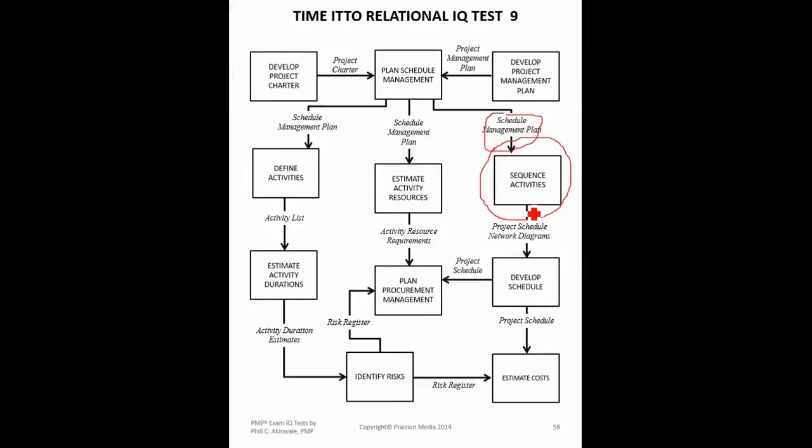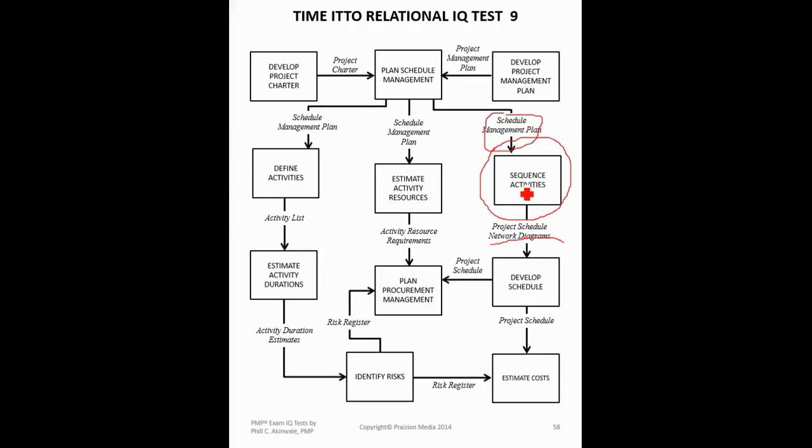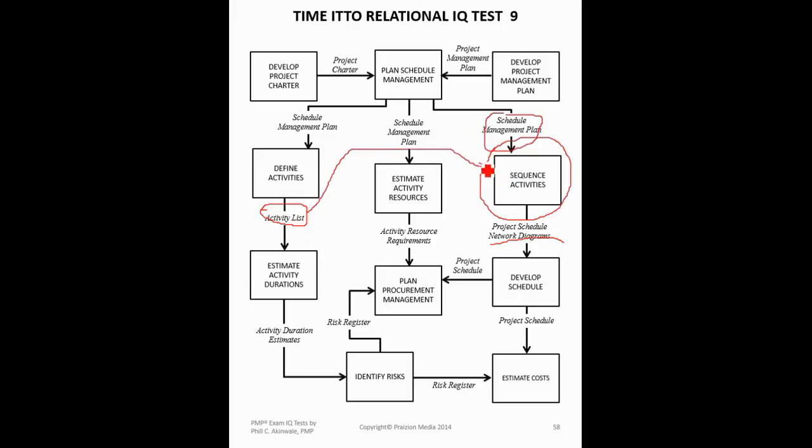And the output you get from it is project schedule network diagrams. Now, in addition to the schedule management plan going into sequence activities, the activity list will also be an input to this. We just don't show it in this particular test.